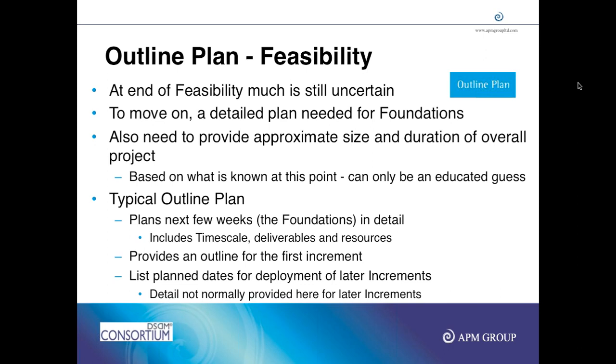The first plan that we prepare is during feasibility, and that's called the outline plan. The outline plan basically gives a high level skeleton of the project, like how many months, how many milestones, and the efforts. Say your project is going to be 10 months, and let's say the feasibility is being done in 2013. So if I start the project with you in 2013, we are, let's say, in November, and we are doing feasibility.